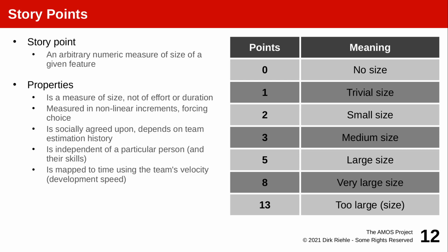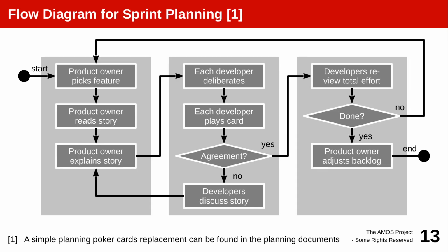So using story points and the planning poker process is really a consensus building process that ideally you carry out consistently over time, and it doesn't matter how many points it actually is. One team calibrates on one size, uses story points for a medium-sized feature, and others on a higher or lower. It doesn't actually matter as long as you're consistent, because the goal is that you learn over time.